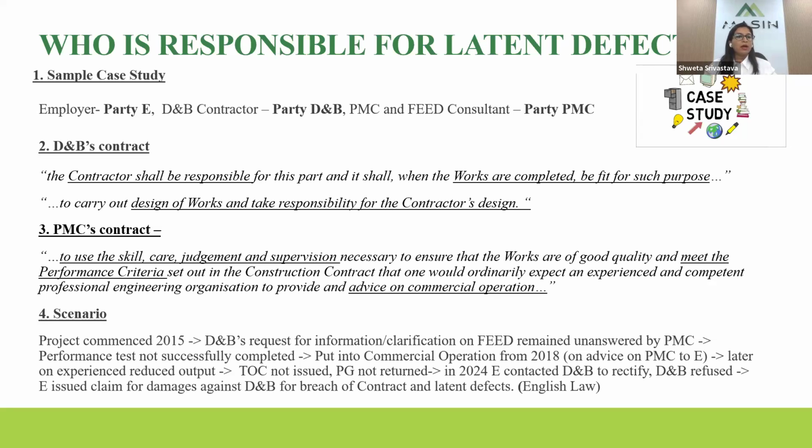Now the DNB contract states that the contractor is responsible for his part and the works which are finally produced must be fit for purpose. Another obligation put on the DNB contractor is that he is to carry out the design works and shall take full responsibility for his design. That's what the DNB contract says, and this contract is governed by English law.